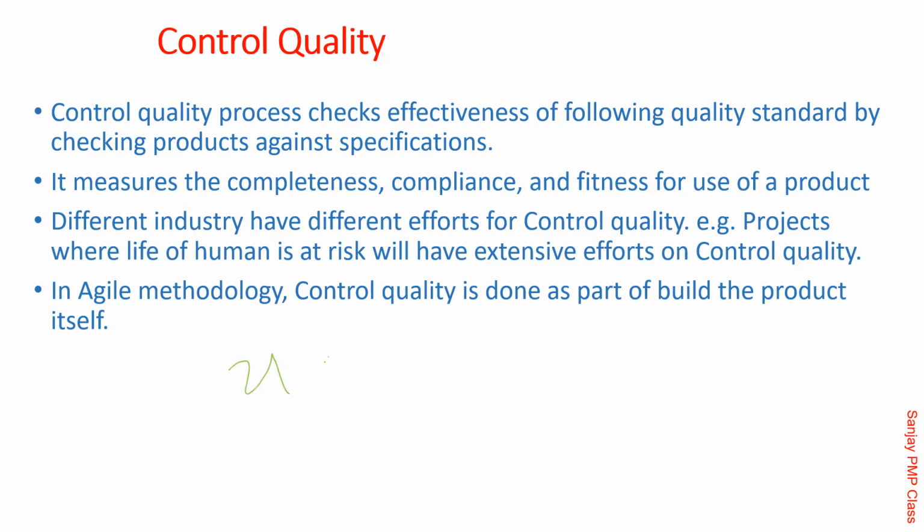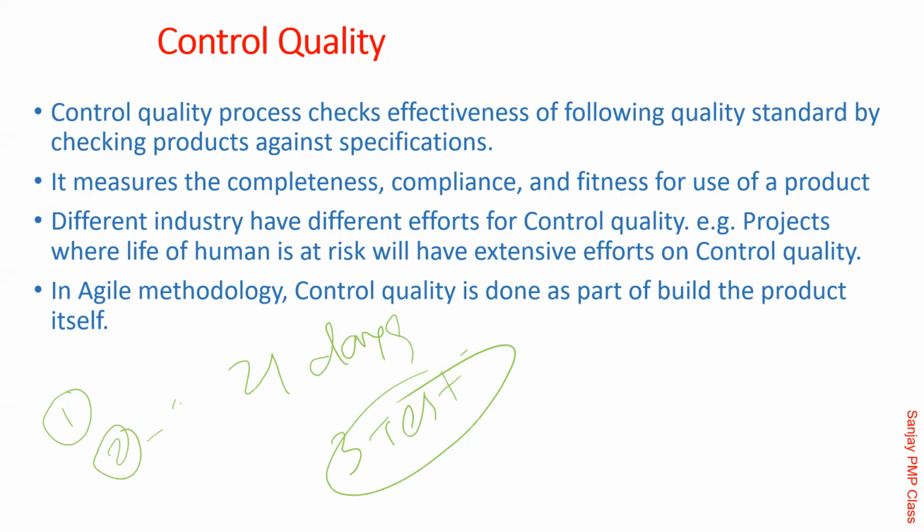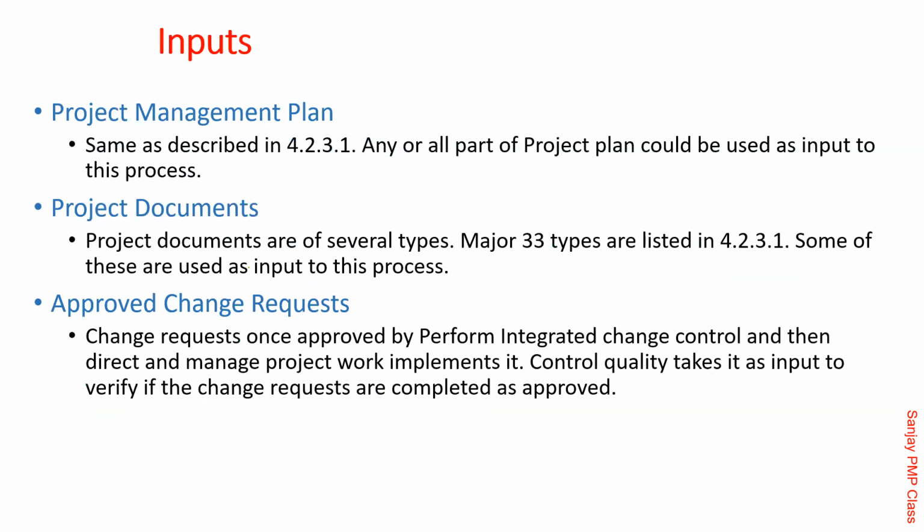If it is a 21-day sprint, it's not that in the last 3 days they will go ahead and do the testing. It doesn't work like that. They will start development from day 2. I'm saying day 2 because day 1 will probably be the sprint planning meeting. So from day 2 to day 20 or 21, they are doing the development as well as testing. Whatever is developed, same-day testing is what the last bullet point speaks about.